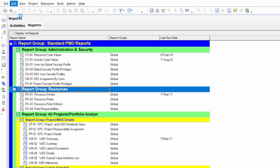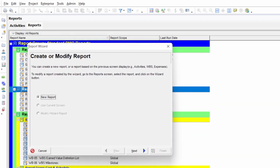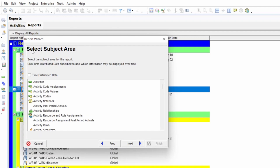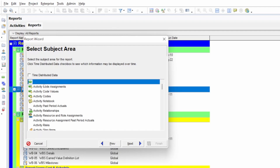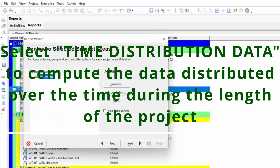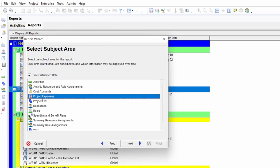When you press the Add button, it shows a report wizard to create or modify a report. Since we selected Add, it will show only the new report option. Click Next, and it will show the next wizard step: 'Select Subject Area.' We have several built-in options. Because we are computing cost distributed over time, we select 'Time Distribution Data,' then click Next.